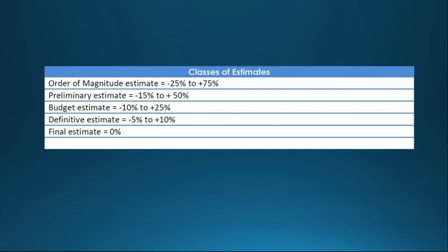You have a preliminary estimate, and I'm glad that I hit this screen because I mentioned this before. I mentioned it again and again. Until you truly baseline your project, use the word preliminary as much as you can. In fact, preliminary schedule, preliminary budget, preliminary estimates, preliminary everything. I've worked for too many hammerheads that you told them something and they just walked out, didn't hear anything else. They heard what they wanted to hear and they walked out the door. Until you're really ready to baseline your project, you are not ready to say a date and a budget. I mean, you're getting close, all right?